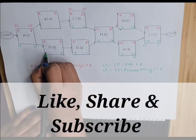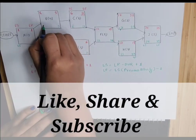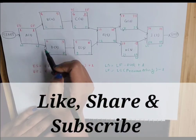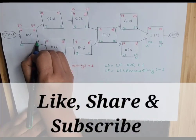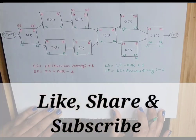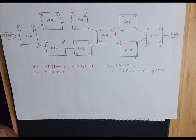Continuing backwards: late finish 11, late start 6; then late finish 11, late start 9; late finish 8, late start 7; late finish 5, late start 2. Again here we have two values, 2 and 7 — we take 2. Then late finish 1, late start 1. This is how we calculate the early start, early finish, late start, and late finish. I hope that this is clear to you.